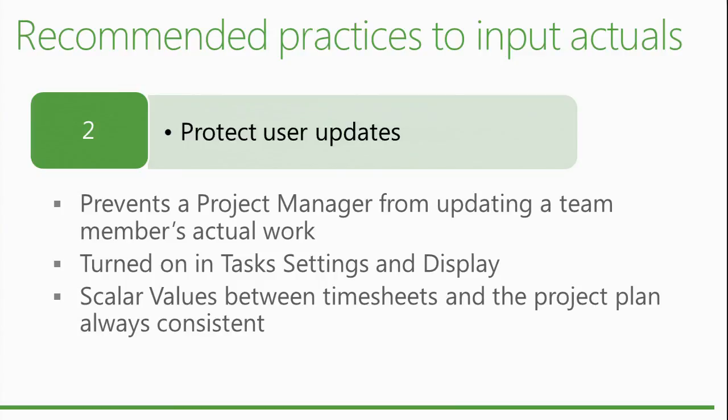If you enter on a week, what Project Server is going to do is look at it, because it stores the data not by week, but in buckets, the amount of time, basically, by day, typically, but it goes even further in the reporting database, where it's by 10 minutes units. So the way it stores the data doesn't matter.